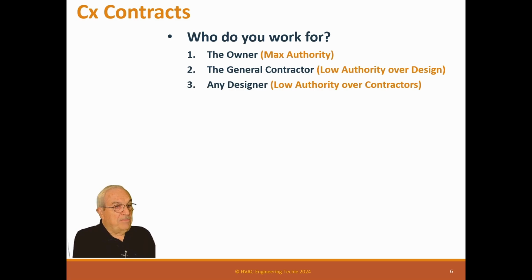Any designer, maybe you can work for the architect, maybe you can work for the mechanical engineer. These are terrible places to be contracted. It's not that they aren't good people and they aren't smart people, but they have a low authority over different people, and you can have a serious conflict of interest. So trust me, it's best to be up with the owner.